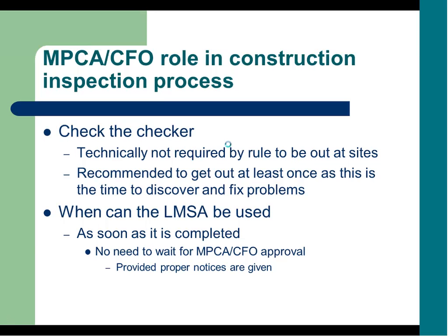When can the LMSA be used? As soon as the structure is completed. There's no need to wait for PCA or county approval. We do have to have the proper notices. If we have not been noticed, again, 3 days before dig, 3 days before backfill, and concrete notification is nice, then there's no reason to wait.